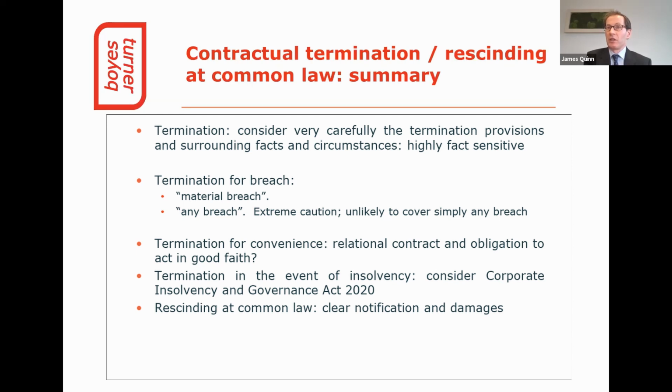Lastly, be aware that following a contractual termination, you will generally be limited to claiming damages for losses which have been suffered up to the date of termination, and not loss of bargain damages for the future value of the contract. And if you are bringing the contract to an end pursuant to a common law right, and not by exercising a contractual termination right, ensure that this is clear in your communication to your counterparty.